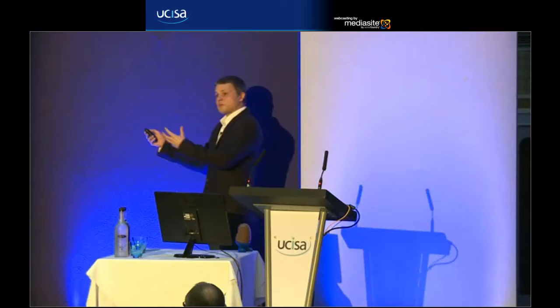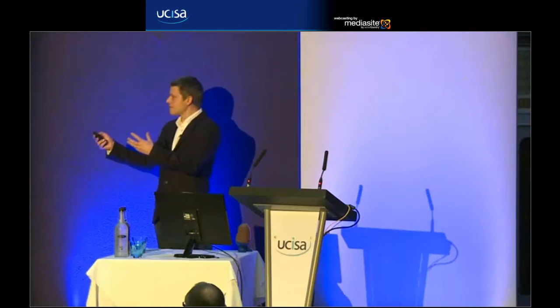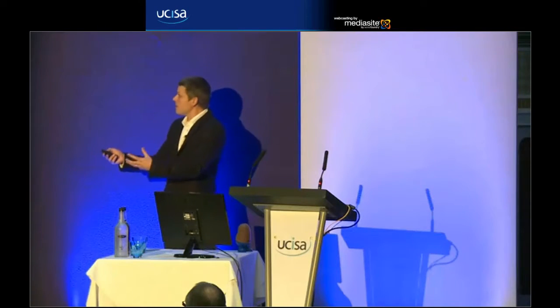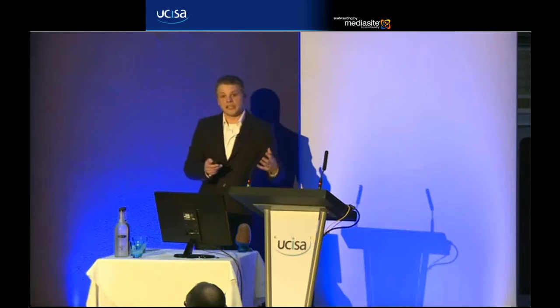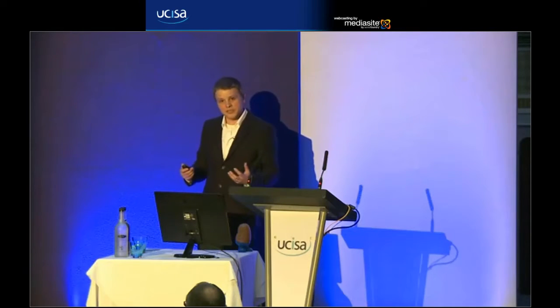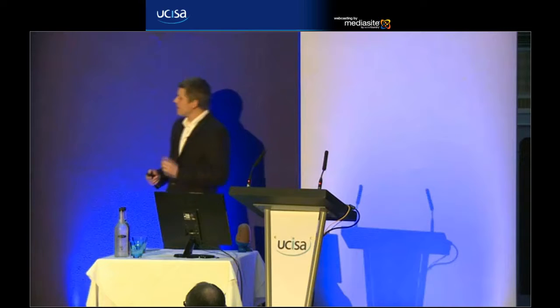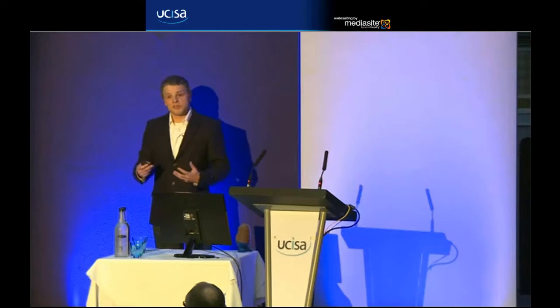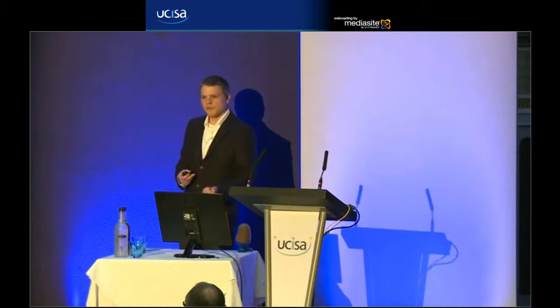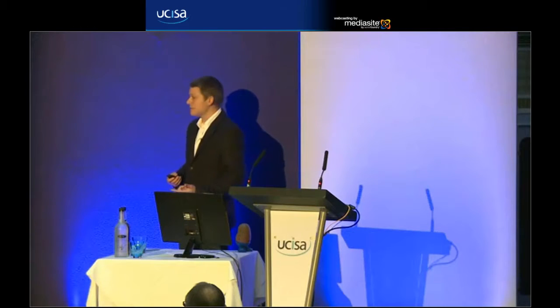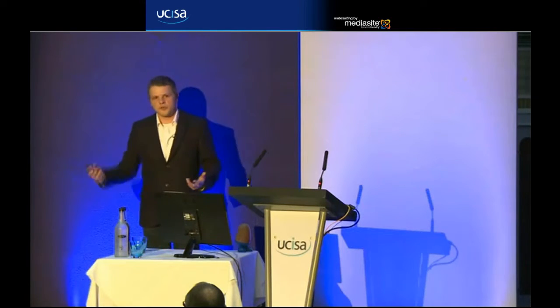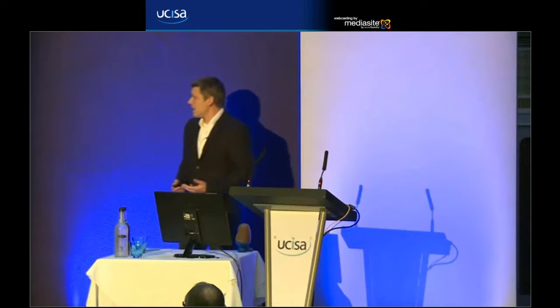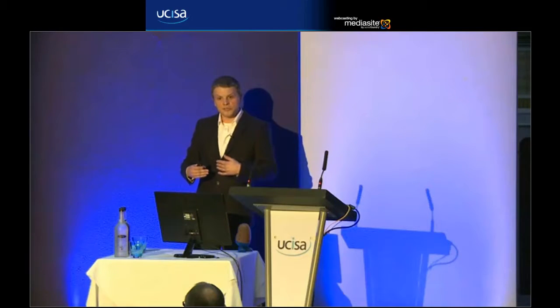What we then do with those requirements, this pile of Agile stories, is go to the developers and say, let's have a look at how big these things are. We've got our list of stories. The development team are going to discuss this, think about what's involved technically, how complicated each story is going to be, and include any thoughts about how we test it. And we're going to work through all the stories.